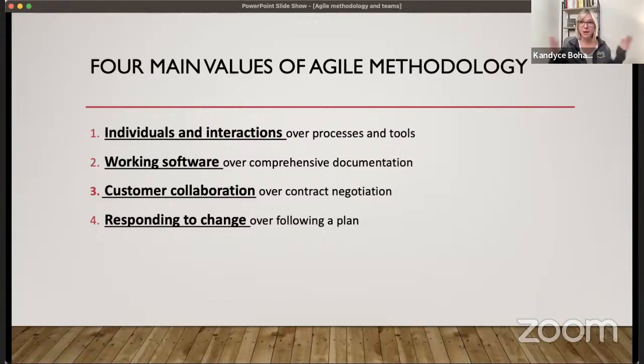And oftentimes back in the day before Agile development, you would really, really try hard to stick to that plan rather than noticing maybe a year in that this idea isn't even worth it anymore. And so by having these smaller sprints, these smaller little iterations of software development, we're able to change course if we need to after each little sprint, rather than having to wait 6 years before we can get feedback from our customers.